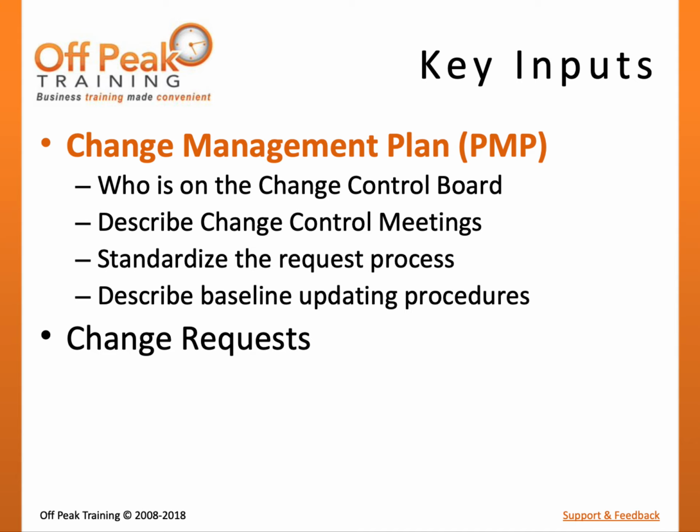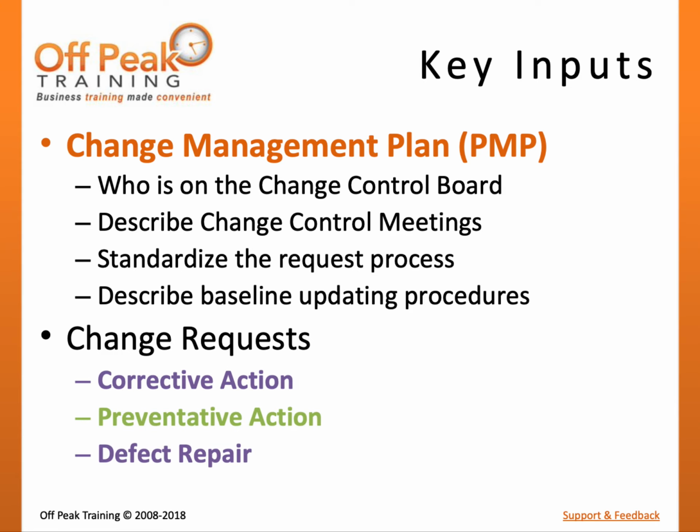Another key input to the integrated change control process is change requests. These two small words have a major role in the project management framework outlined in the PMBOK guide. Simply put, change requests represent suggested modifications to project baselines or deliverables to make corrections based on actual performance or suggestions to improve future performance. Change requests are an output to several other project management processes in the execution and monitoring and controlling process groups.